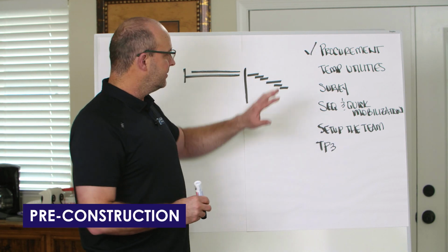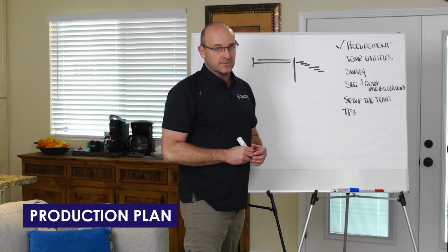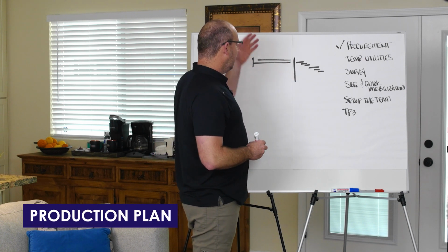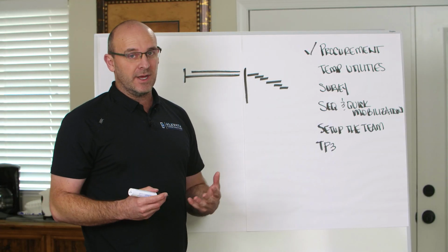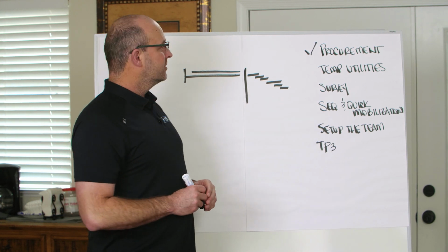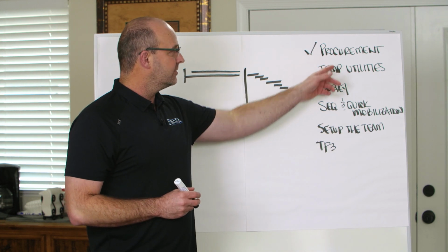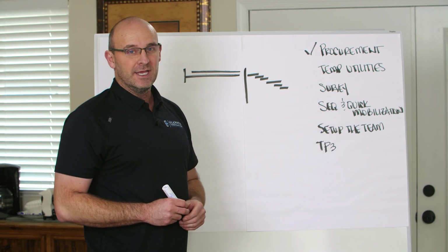And the way that I like to do this is if you have a macro or a norm level TAC plan, meaning your production plan, you work those back and you trigger those, you start the buyout and the procurement process when it's needed so you can start right here. So if you want to know how to really manage a construction project early on, make sure that you're managing procurement in a remarkable way.